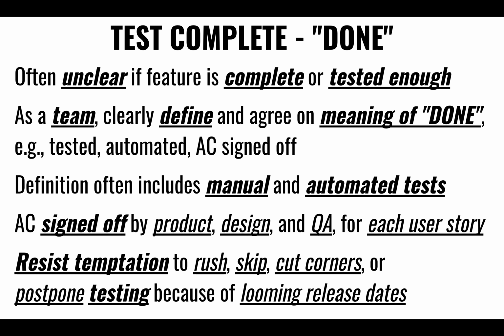Whereas if you ask a business analyst or QA engineer, they might not consider that to be done, right? They might say, hey, what about all my tests, right? Your unit test worked. What about all my tests? So not until this is deployed to a QA environment, not until the QA engineer has executed all their test plans, their automated tests, their integration tests, not until it passes all that, should we consider this to be done, right? So again, a different perspective of what we might mean by done. Or perhaps the business analyst might consider that no, not until it's in staging or ready to go to production do I consider this to be done, right?